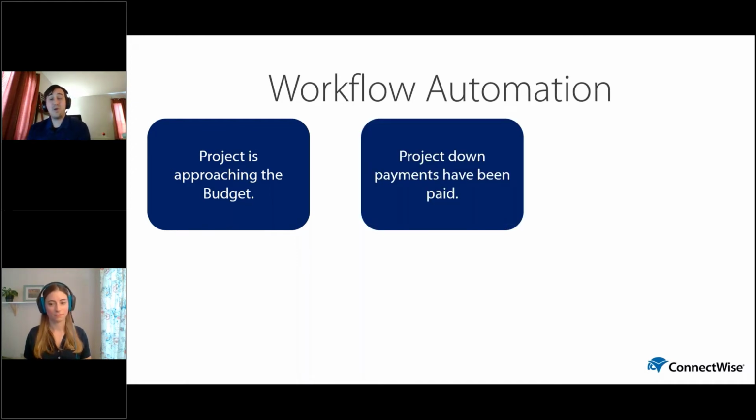If your projects require down payment before work can begin, what we don't want is the customer to make that down payment and then work sits idle for a little while because the finance person who collected the payment forgot to let the project manager know. Rather than rely on someone to pass some information along, we can have Manage monitor your projects and their associated down payments. So as soon as that down payment comes in, the project manager is notified and work can begin on the project.